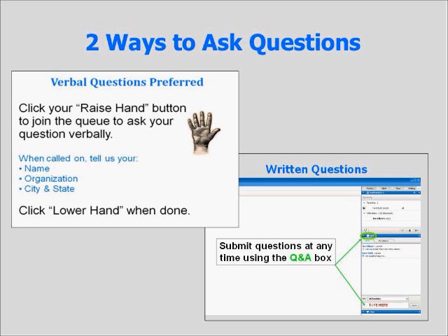And that 10% the developer is going to pocket, not that's going directly to the builder. It's not the builder's overhead and profit. That is supposed to be going to the builders. That's what I'm assuming because of the name builder's fee, but I don't think that should be right. Well, if it's going to the builder, it's not necessarily a problem. If it's going to the developer, it definitely is a problem. If it's going to the builder, you still need to determine that. Normally that would be built into the contract price. So, if it's not built into the contract price, it's not.